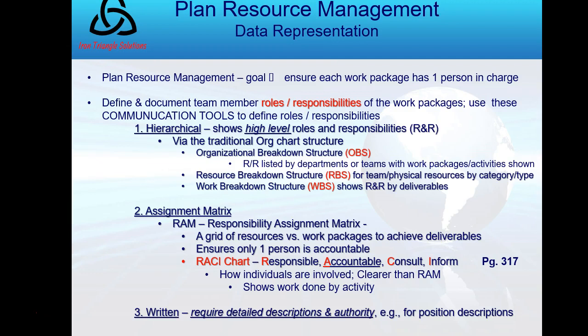A RACI chart is a type of RAM. Notice the RAM was about work packages to deliverables, where the RACI is going to show the work by activity. No longer the work package, but decomposed down further to the activity itself. So that makes it clearer than the RAM itself.